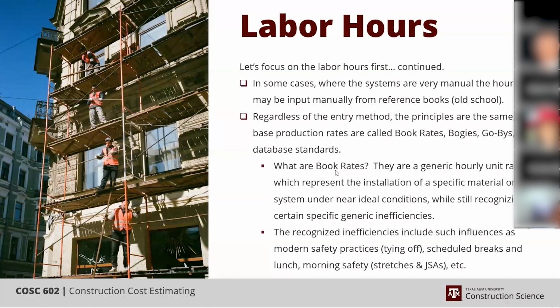We have lifelines that have to be set up now, and you'll see lifelines on highway work, in buildings, and in industrial. They're everywhere. You used to be able to walk on the steel. Now you have to scoot on the steel. Now we have mandatory stretching in the mornings. We have the JSAs, the job safety analysis, that has to be talked through every morning before the day starts. And we have regular scheduled breaks.